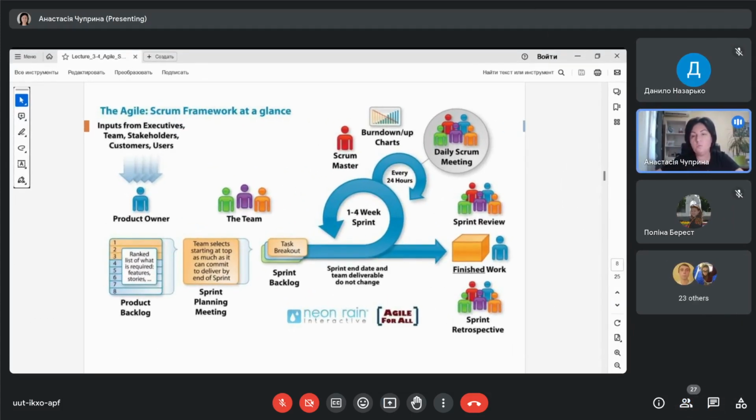This is too much. This is bigger than your working hours. So what you should do is decrease the number of tasks in the current sprint. You have to take away a few tasks and move them to the beginning of the next sprint. So now you have the same amount of tasks as you have planned. It's okay.